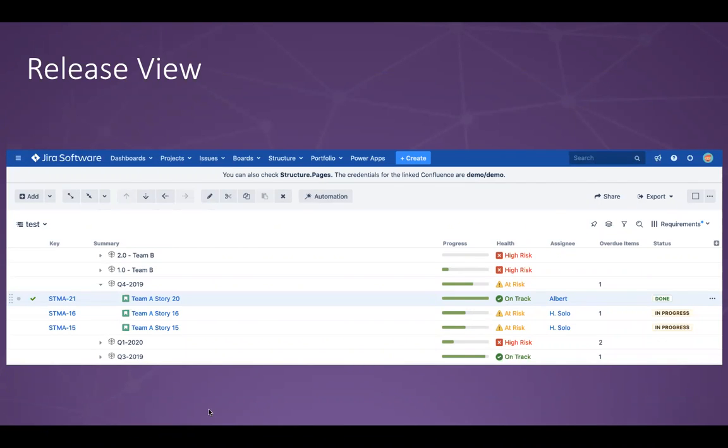Yeah, I wanted to build a little bit on tracking releases and using the ability to query some of that information to basically build an overview of the release health. And obviously, this works for the sprints and for the epics as well. What we can simply do is query the due date and the status. So if an item is on track to be released, so we haven't passed the due date yet, or we've already completed the item, then we can say everything's on track.